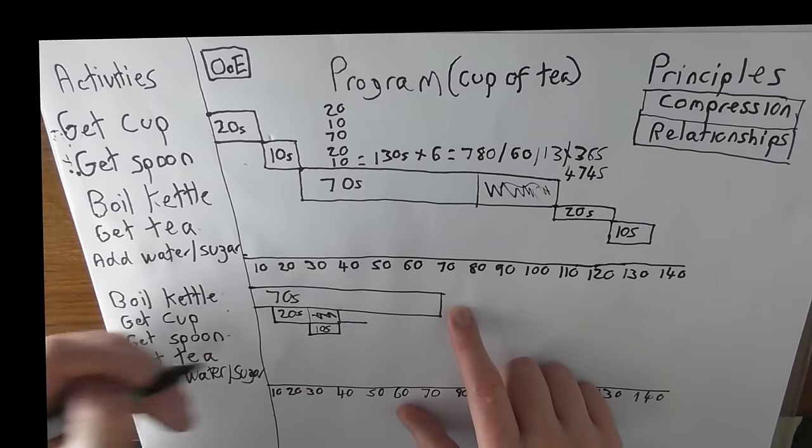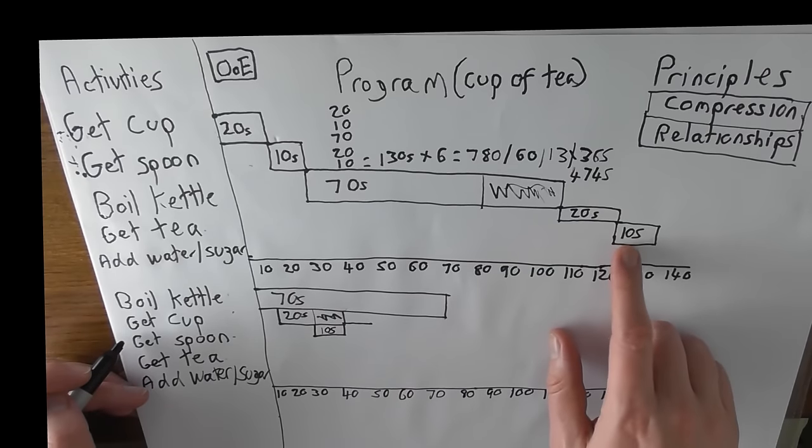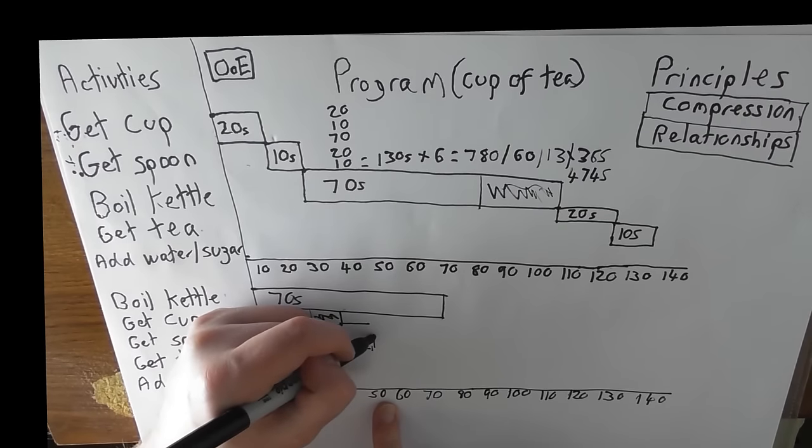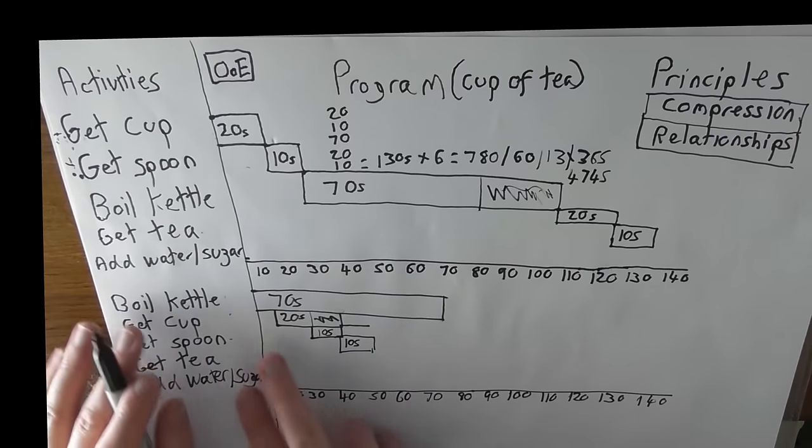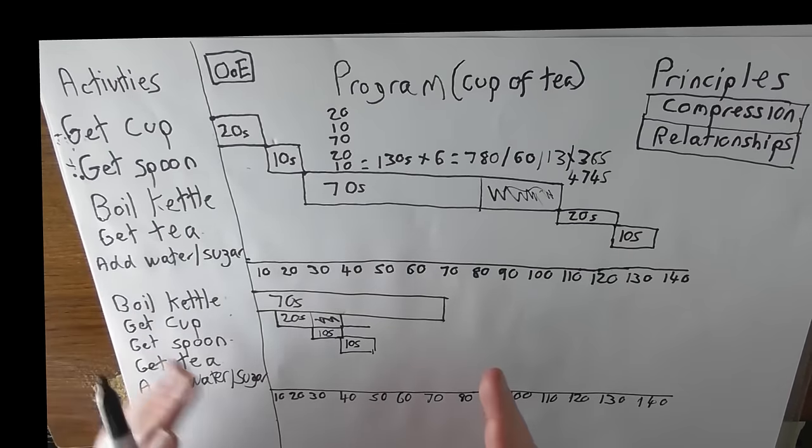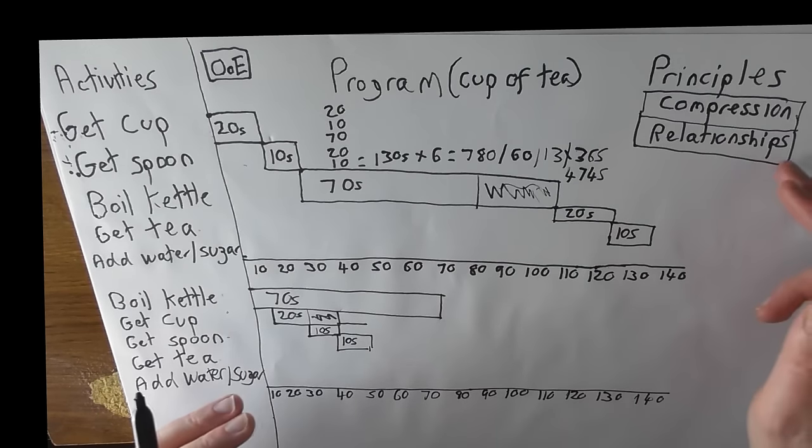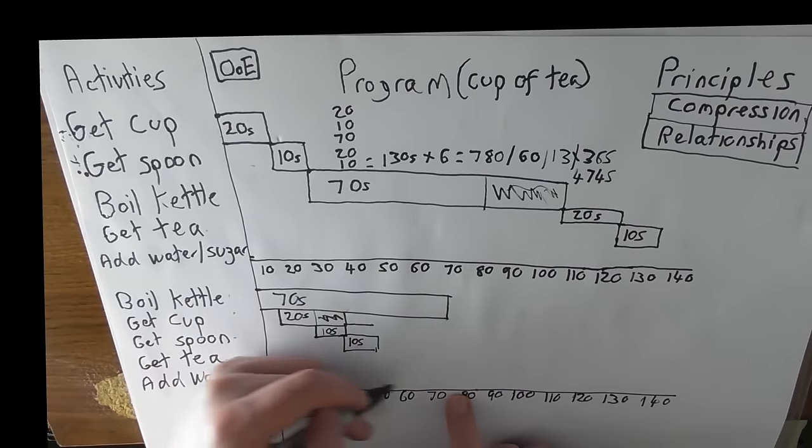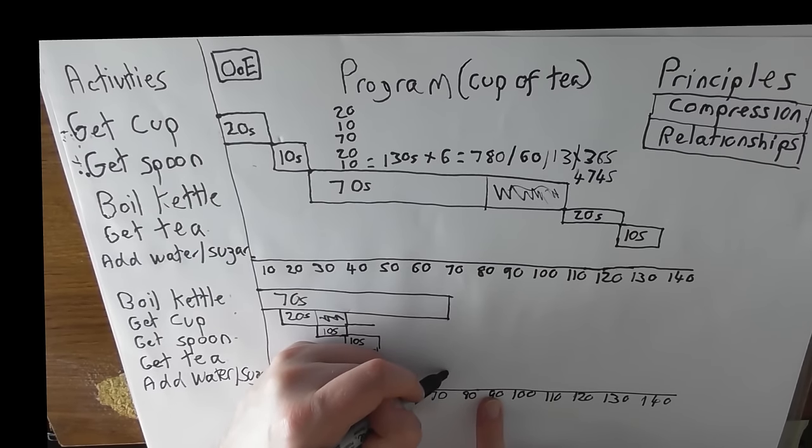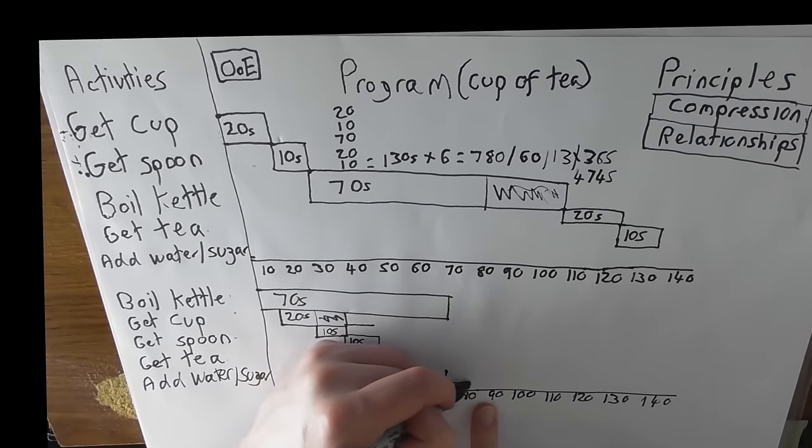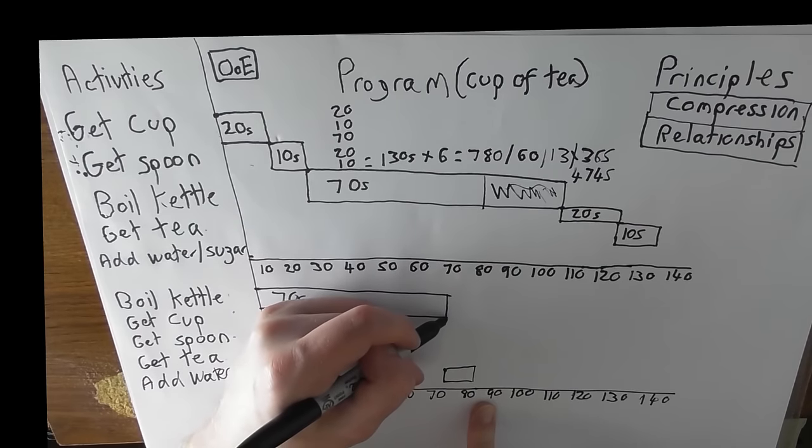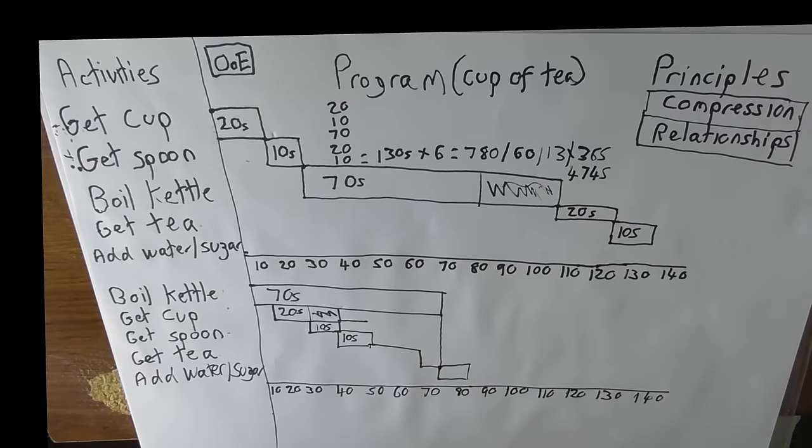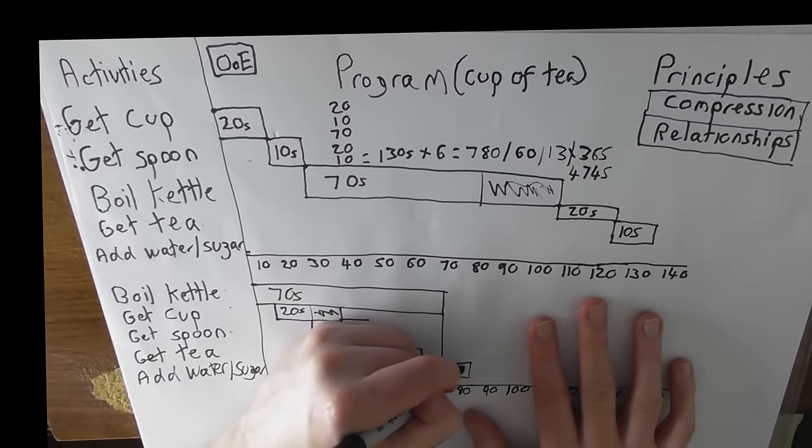Our get spoon activity starts here at 30 seconds for 10 seconds. Our get tea activity was 10 seconds. So we go from 40 to 50 for get tea. This is all happening while the kettle is boiling. Which, as I said, is compressing your schedule because of relationships. Now the add water and sugar can't happen until the boil activity is finished. So it's still happening down here. And it was 10 seconds. So it takes you from your 70 to your 80. And on a schedule that's represented by a little line that just comes down there. And that leads on to that. And that leads on to that. And this was 10 seconds.